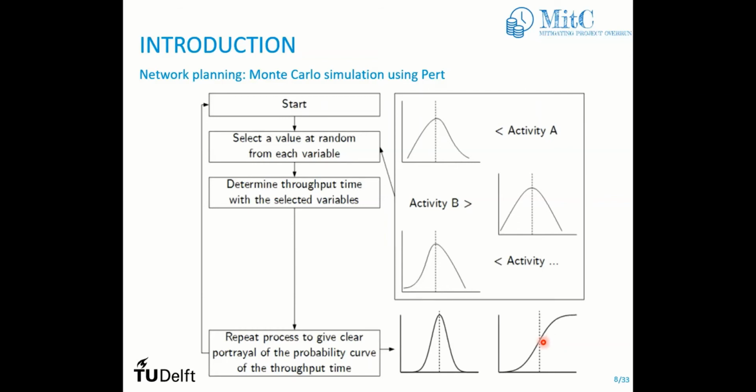When you have the CDF, which is the distribution of the project duration, it is no longer deterministic. It depends on something called probability. So it's not that our project is going to take 1,000 days. We say it in another way: it's going to take 1,000 days given one probability. So it's conditional on the probability of your preference. We're going to see this in the very next slide.